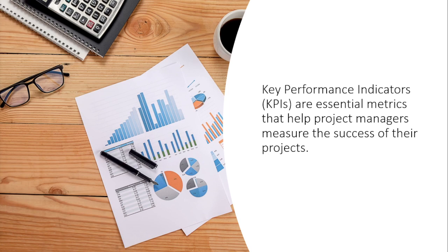There are so many things to measure. When it comes to baselines, you could talk about start and finish dates, effort and duration, schedule variance, schedule performance index, going into earned value. And when it comes to resources, we could talk about planned resource utilization compared to actual resource utilization. And we could talk about planned resource cost compared to actual resource cost, and so on.